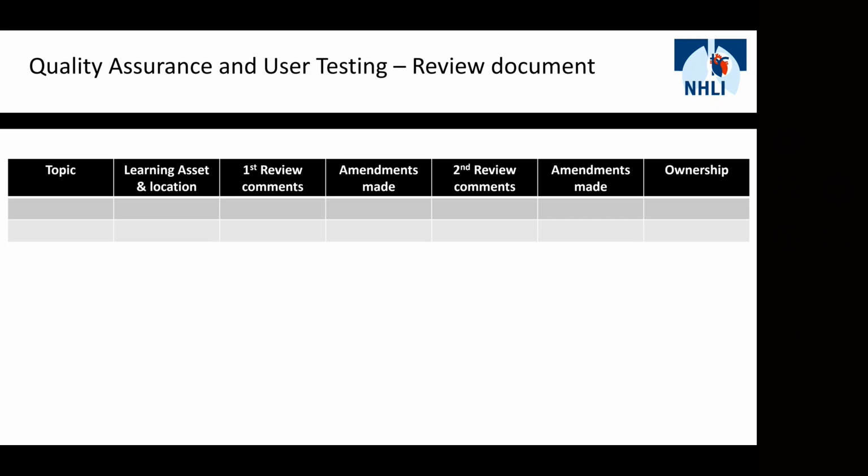Now, again, from experience, the tricky part will be if someone's changed their mind around what they wanted initially, and then during the review stage, they come in with a lot of changes. That has happened previously. And what you'll tend to find is, if you imagine a project timeline going from top to bottom, we now start having a horizontal timeline where we're spending a lot more development time within the first and second review than was initially intended.